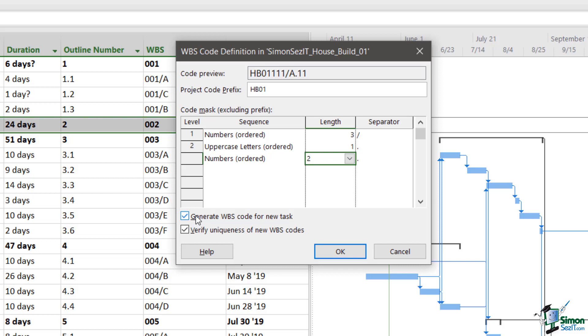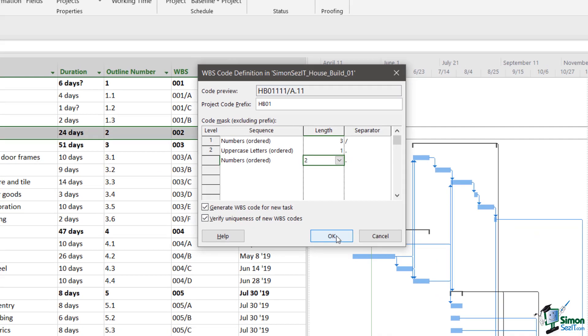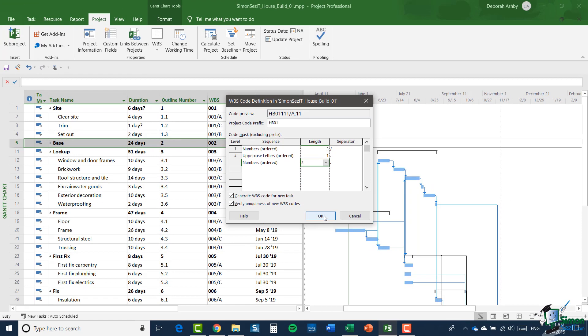And then there is a second check box, verify uniqueness of new WBS codes. So do I want Project 2019 to make sure that when I put a WBS code in, it's unique? It's not already been used. So I'm going to say yes to that as well and keep that checked. Now those last two choices are actually very important, and particularly if you think about the first one. Do you want Project to generate WBS codes for you, or are you going to enter your own? If you've been given all of these WBS codes and they may not follow a very specific sequence, then it's important that you uncheck that because you're going to need to put your own WBS codes in. But as you can see, I've got both boxes checked. I'm going to click on OK and just watch what happens when I do that.